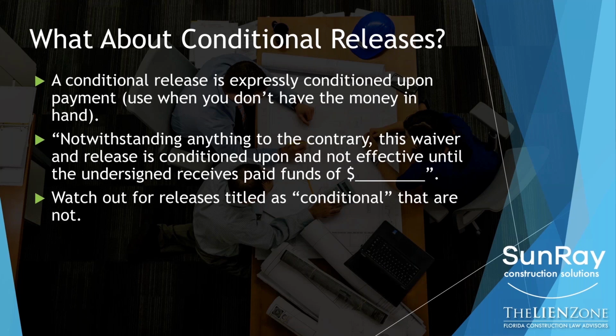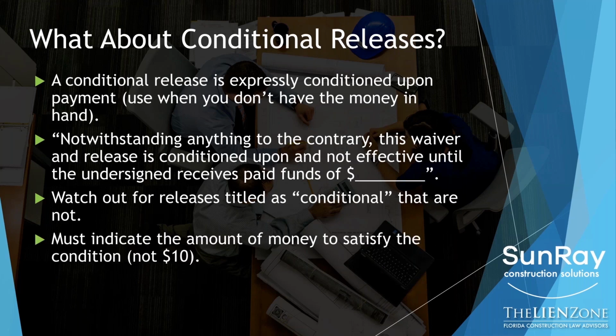You have to be careful for releases that are titled conditional, but when you read the document, they are in fact not conditional. So the title of the document by itself does not govern how it works. What matters is what's in the body of the document. So we have seen releases that are titled conditional releases, but when you read them, they're not conditional at all. So you need to make sure that you read them and it has language that expressly conditions the release on you receiving the money that you are expecting.